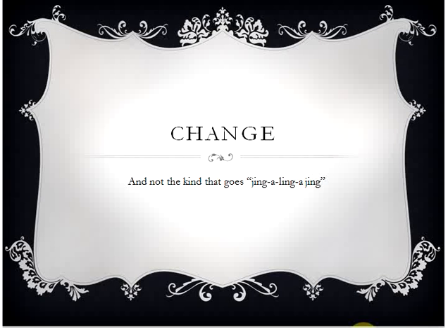There might be a holiday coming up or some function that wasn't realized, or several of the support staff may be out at a conference that wasn't realized, and so it's best to schedule the change so that the support staff are not out at a conference and they're available to help. These are all things that would happen during that meeting. And the ticketing system or application that's being used will help track those changes.